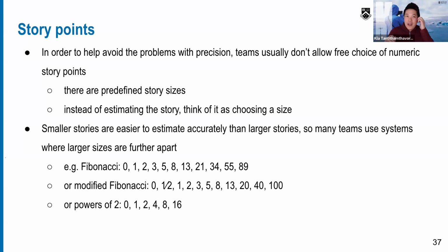Let's say within a 1 week sprint, you have two software engineers. You know how many story points are in your capacity. And when you do project management, you need to prioritize. If a task takes one, let's say in 1 week you can do 20 story points. If each task takes one, we can take 20 of these, right?